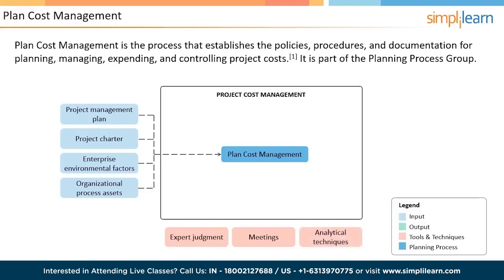Several analytical techniques may be used to determine the cost management plan. These techniques help to map the impact of various decisions on cost. For example, how do risk management processes impact cost, etc.? Cost management plan is the primary output of this process. It establishes the units of measure, levels of precision, organizational process links, control accounts to be used, rules for performance measurement and reporting, frequency and methodology of monitoring the costs, and various other details that lay the overall framework for cost management on a project.